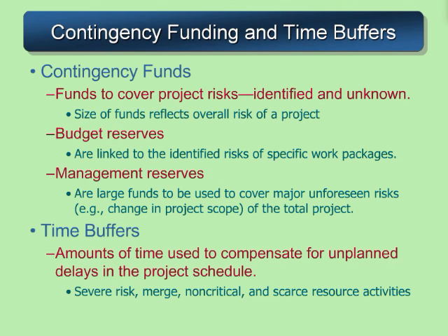Within a project's funding, we should have contingency funds established. Funds to cover the project risks, both the identified and the unknowns. And the size of that fund might very well be reflected upon how big the project is. And we can think of contingency funds in 2 different ways. We can have funds for our budget that are linked to specific risks within the work package that have come up in the risk management plan.